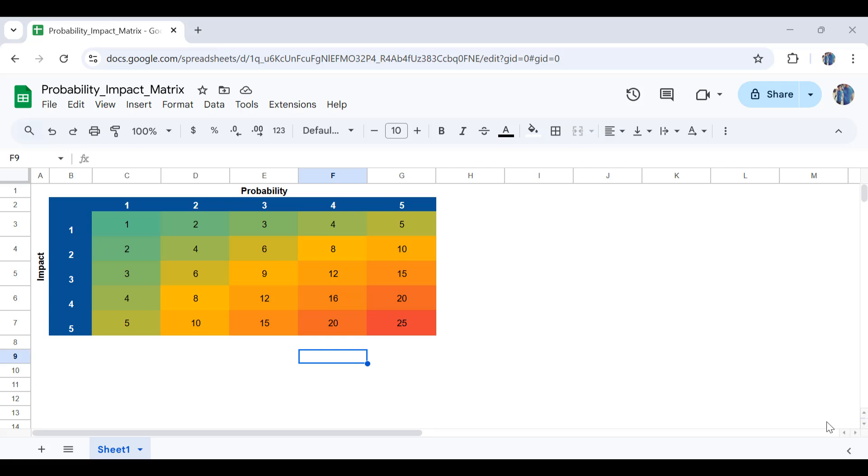So if a risk is of high probability, which means that the risk is highly likely to happen or occur, and also if it occurs the impact will be high, that risk goes to the top of your list. While a risk with low probability and low impact goes to the end of your list. So that's how this matrix is used to analyze risks qualitatively.